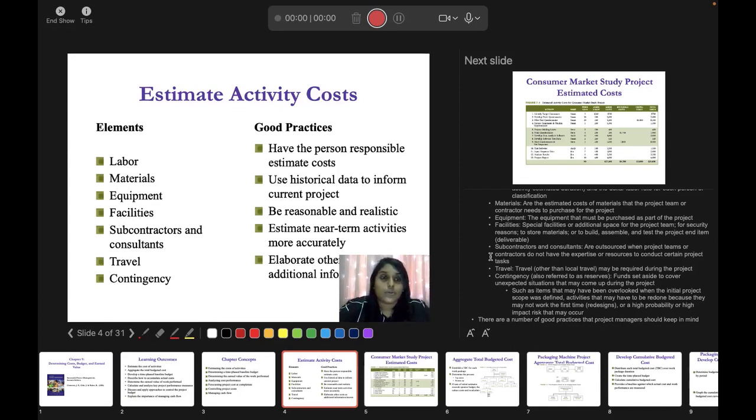Okay, right now you have planned that your labor is going to be 5%, and you only allocate your budget for that particular 5%. But let's say time is getting delayed and you want to hire another person, you want to add on 2%, then you will use this contingency fund, right? This contingency fund will help you during an immediate or emergency situation, when something comes up which was not planned earlier.